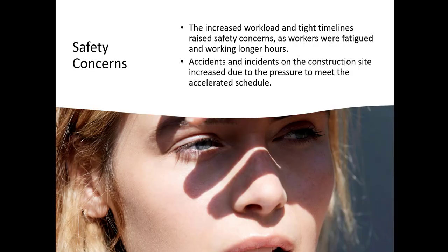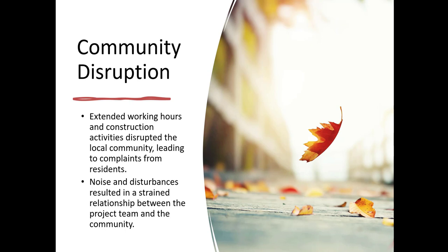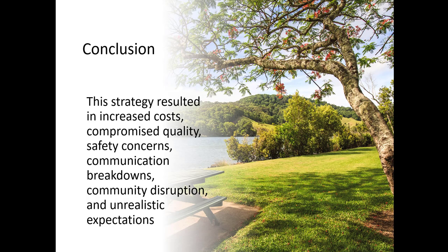Safety concerns was another thing. The increased workload and tight timelines raised safety concerns as workers were fatigued and working long hours. Accidents and incidents on the construction site increased due to the pressure to meet the accelerated schedule. There was also community disruption. Extended working hours and construction activities disrupted the local community, leading to complaints from residents. Noise and disturbances resulted in a strained relationship between the project team and the community.